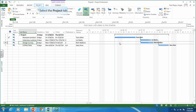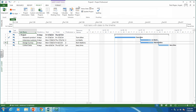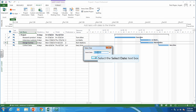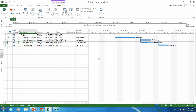One thing you should also do is set the status date. We're about halfway through, so let's say the status date is July 25th. Always make sure you have that set. So to summarize: this needs to be auto-scheduled, baselined, and given a status date before you add any status. That's the answer to question one — that's what your output file would look like.